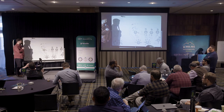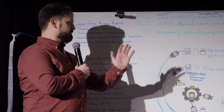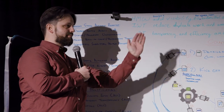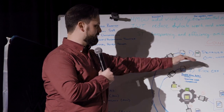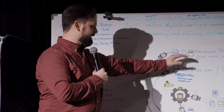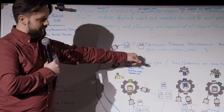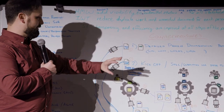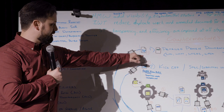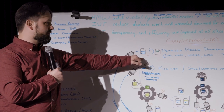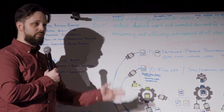Did you think about using the submittal process for deliverables outside traditional product submittals — things like safety documentation? The main thing is getting these parties talking. In software there's a concept called shift left — extreme pre-planning. In construction, the GC fully understands what they're going to build, and the subs fully understand what the architect or engineer expects them to turn in. If safety documentation comes out of the submittal log, that becomes an obligation, and it gets relayed down to the trade contractor.